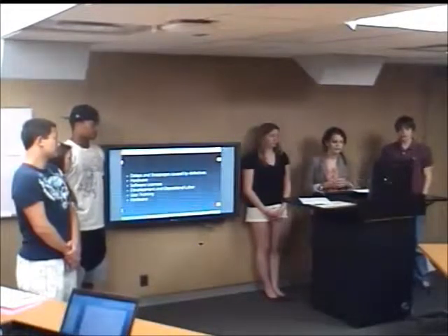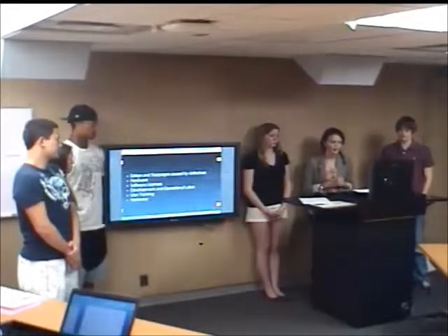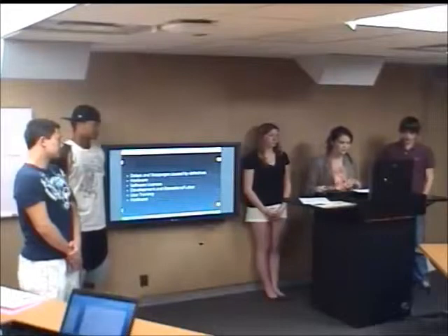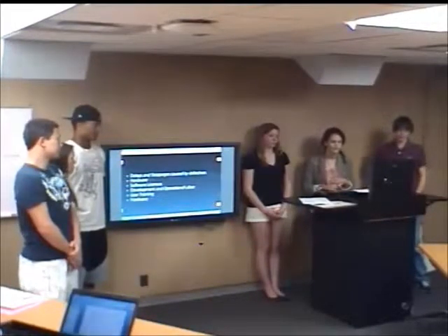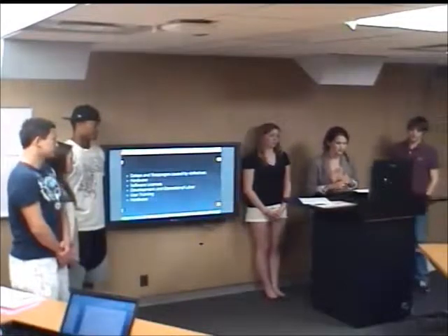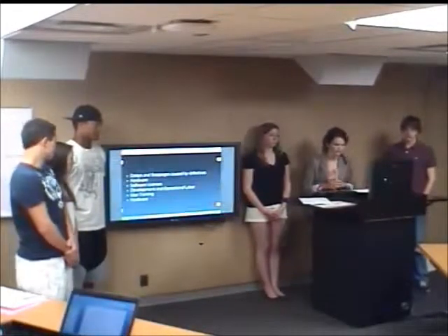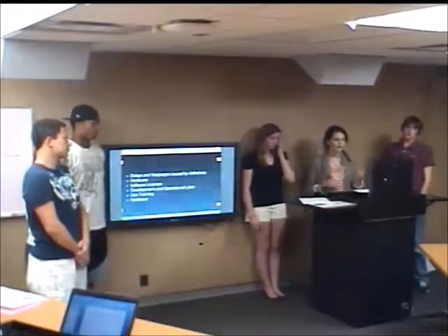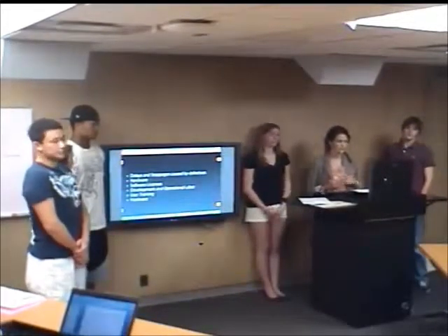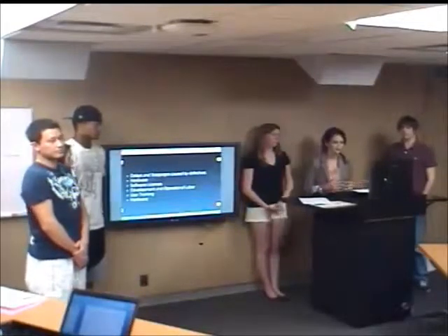The developmental labor is also another cost to consider. We were going to implement 2 new employees. The average salary for a current GT OIT employee is just over $51,000, so we allocated a little over $100,000 total. This really accounts for the scope of the changes and makes sure that the modifications and everything will happen.